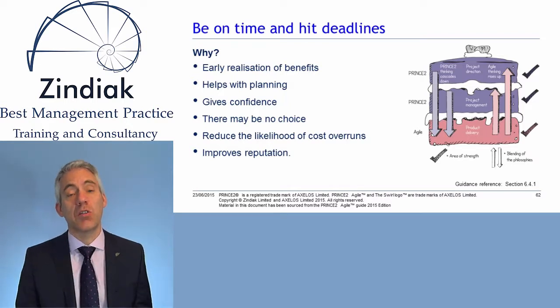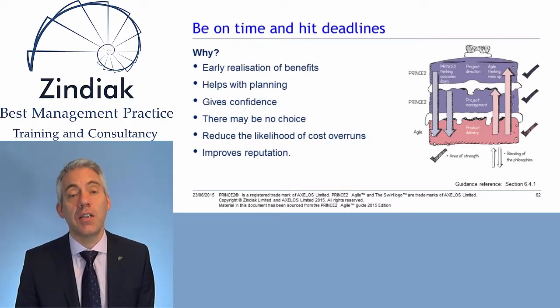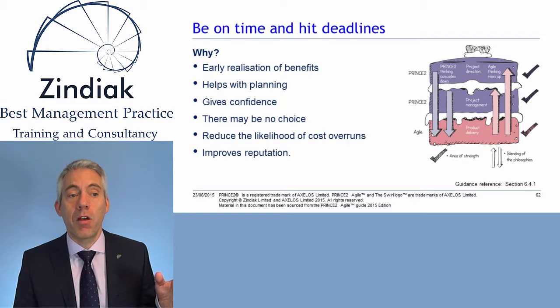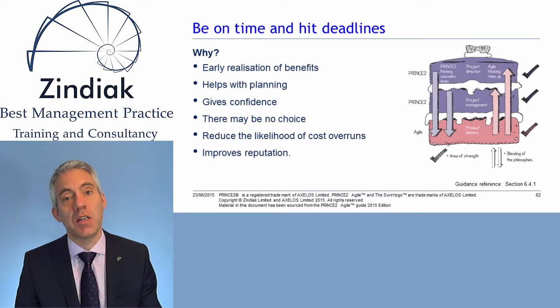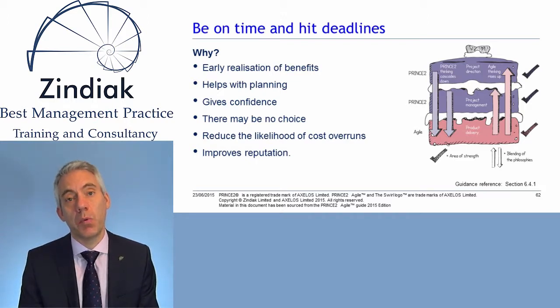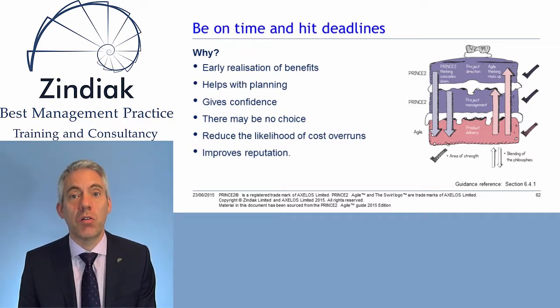And that's something I talk about on the PRINCE2 project in terms of, are we recording effort on projects in the same way that we record the estimates of work? So if we're estimating a piece of work is going to take 10 man days, are the people working on the project recording their time in such a way that we know if it's taken 10 man days or not?